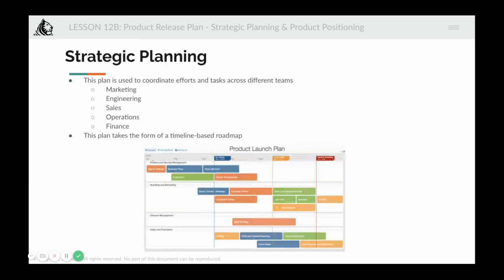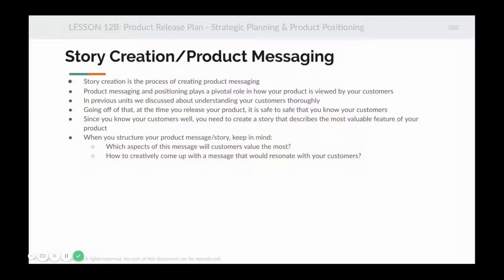The end result of these discussions typically takes the form of a timeline-based roadmap, also called a Gantt chart. You can use normal Excel sheets or more sophisticated tools like ProductPlan or Aha. Excel sheets are considered the norm because they're easy to share and print. I strongly recommend keeping a whiteboard, especially when a major release is in line — create a plan, put it on the whiteboard in clear sight so it's visible to everybody and they can immediately see where things stand.